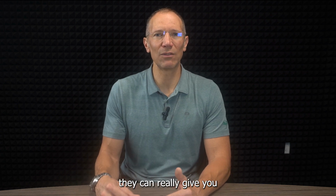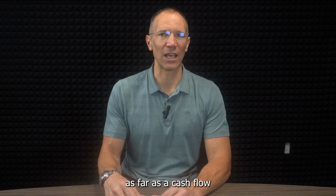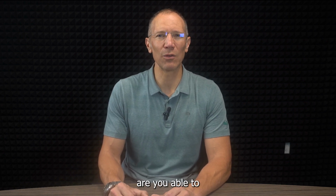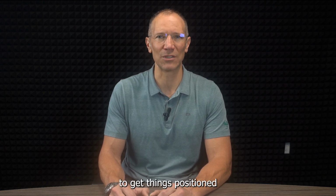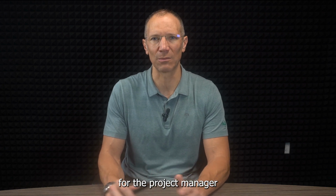They can really give you some insights and ideas of where your estimates and your bids, as far as a cash flow projection, have gone. How effective are those going to be? Are you able to get 8 good hours on the site, or does it take too much time to get things positioned and staged and crafted? Little tools like that are going to be helpful for the project manager to be included on.